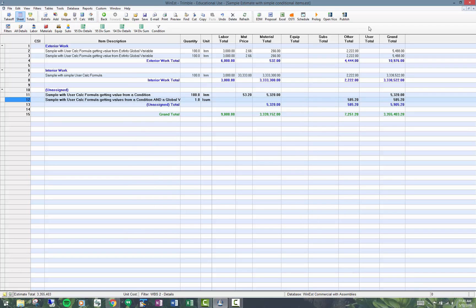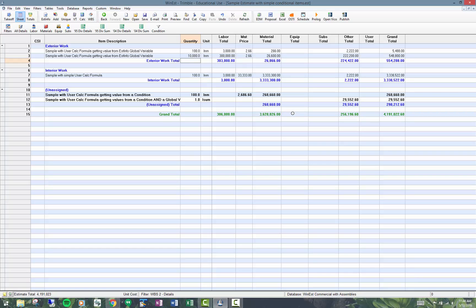So these calculate dynamically, meaning that if you're changing the price in here, it's going to change the price on those items below. Pretty cool. And that's conditional items.